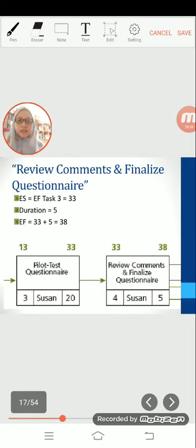Okay, next, review, comment and finalize questionnaire. When pilot test questionnaire is finished on day 33, review, comment and finalize questionnaire can start. It has an estimated duration of 5 days. So, ES is day 33 and EF is day 38.